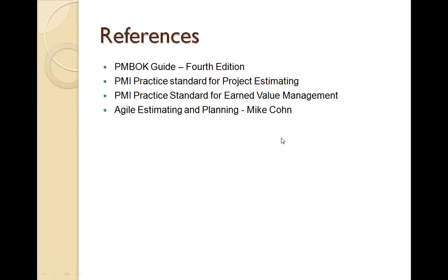Now, when we start a sprint, which is a 1 week duration of a project cycle, what we try to do is create a work breakdown structure. So we take a requirement, we identify all the tasks of that requirement, and we estimate the number of hours required for that requirement. So we know that there are 4 requirements, and these are the tasks, and this many hours of work is required for that requirement.